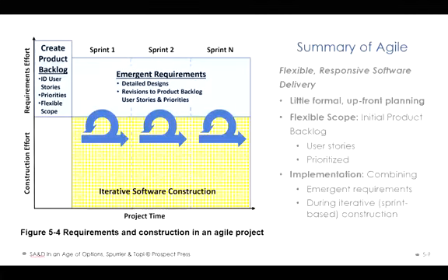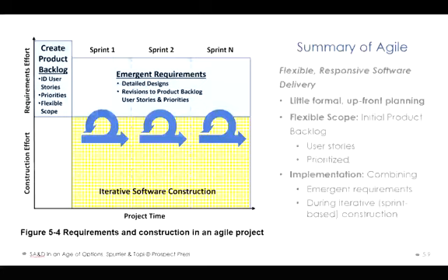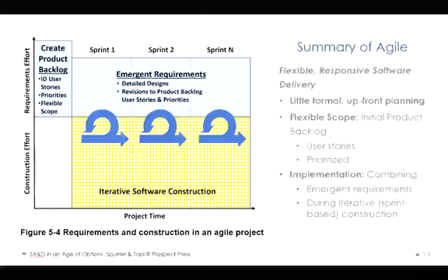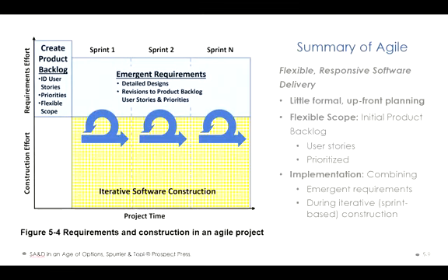That small change in the system does not affect your software that much in terms of functionality and performance, but it will increase the perception and help the usability of the software. That small requirement is usually a good candidate for the agile methodology. Every time you have a small change, you build something new and you test it, go through this little cycle, and we call that an iteration. That is a typical suitable project for agile methodology.